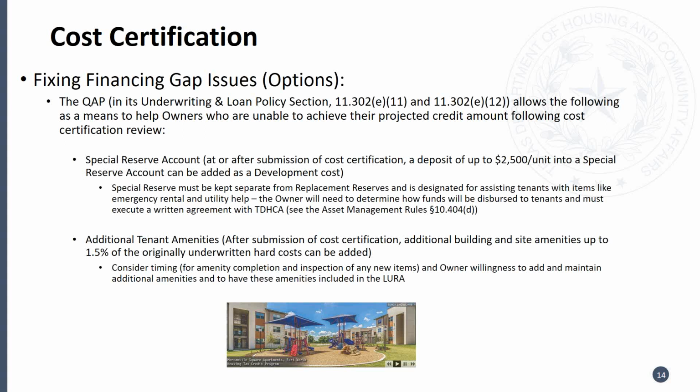Okay, you got another one. What change from the application will need to have a request for an amendment? Oh, it's a whole list under statute, under the rules. It can vary. We see all types of things. Like I mentioned, changes in the square footage reductions are the big ones. If it exceeds 3% or more, that requires board approval. Changes in the number of buildings, changes in the residential density of at least 5% require board approval. Sometimes that happens just because of right-of-way dedications that were not expected at application.